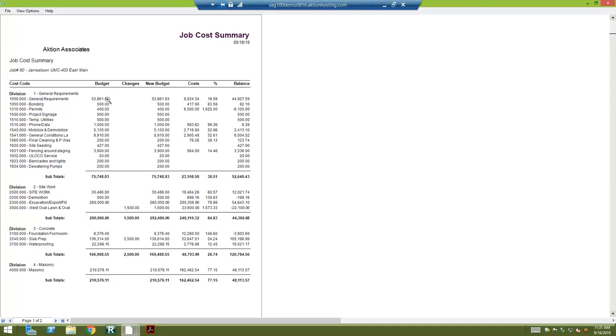That amount from the budget, when we enter the job budget, is going to be in the first column. Second column is if we had any budgetary change orders, any parts of the change order that needed to affect a line item in the budget. Then you're going to get your revised budget.